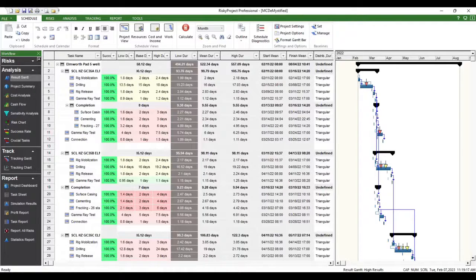Now I don't know if that would work either. But that is a certain level. So it's exporting out a determined value, not a range of values. It's exporting out a certain percentile confidence level as a deterministic schedule. So it's not giving you low or high estimates or low and high results. It's just giving a single value when you export it out as an XML file.